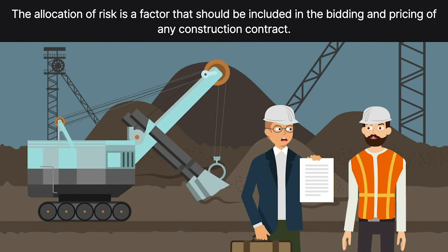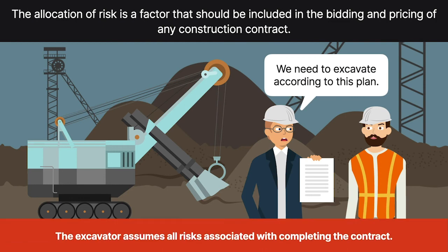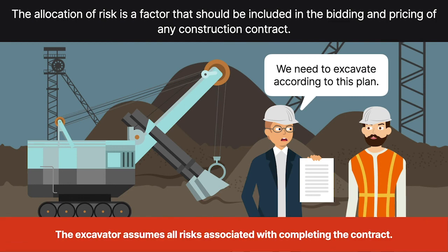Now, the first issue that I look for in a construction contract is who is going to be bound by the contract. Now, you may say this is a no-brainer because it's the parties to the contract, but you would be surprised how many times people who are not a party to the contract will sue in tort. For example, a subcontractor who is delayed on the project because of the owner's design people having provided faulty plans. There's no privity of contract between the owner and a subcontractor, and therefore the subcontractor doesn't have a claim against the owner because there is no privity.